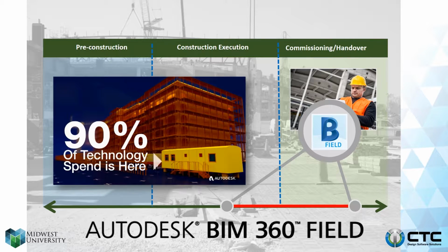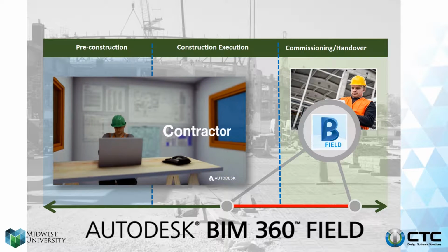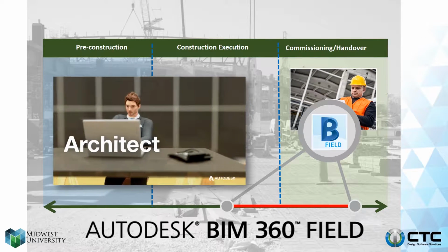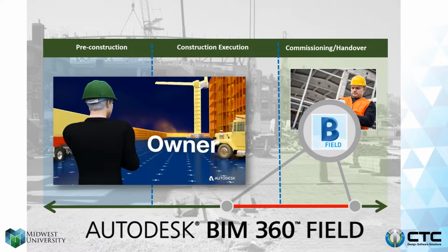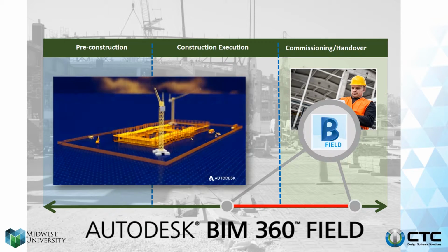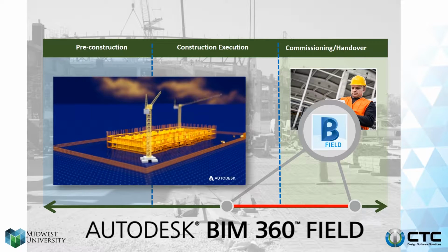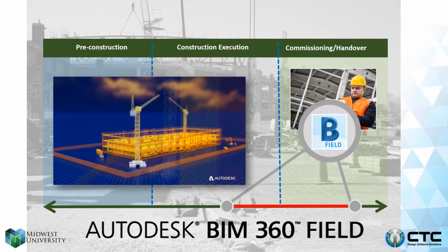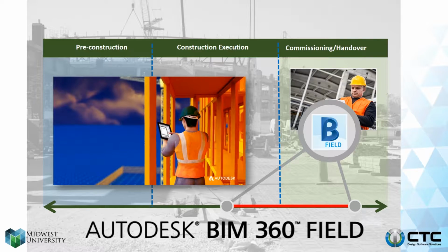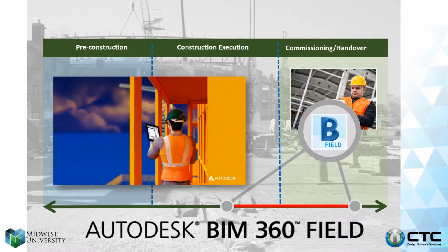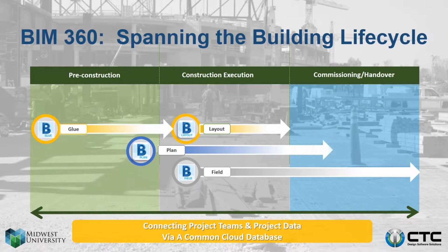Now, this is really important because collecting information throughout the construction process allows us to make a better turnover to the owner. It's structured information, connected information. Not only connected, it can be connected to the model through BIM 360 Glue, but also information that's captured, organized, and eventually published, exported to specific formats, such as COBie. Let's look at the next one.